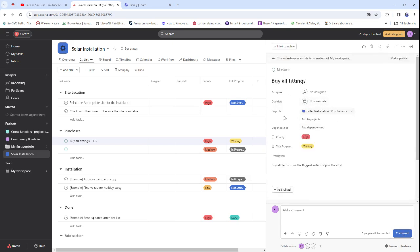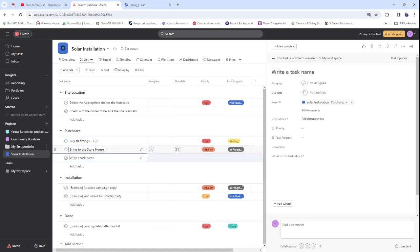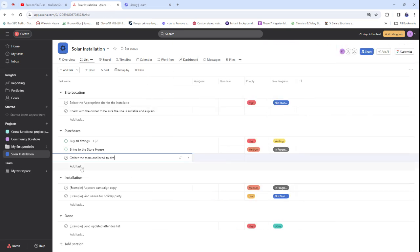We haven't added any team members yet — we're still setting up the tasks. After buying all the fittings, we add: 'Bring everything to the storehouse.' Then after that: 'Gather the team and head to the site.' These tasks will be assigned to different people on your team.